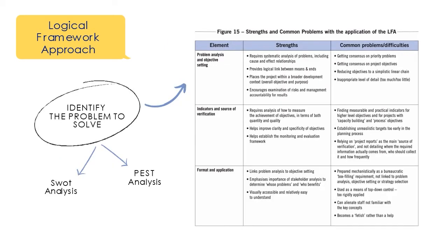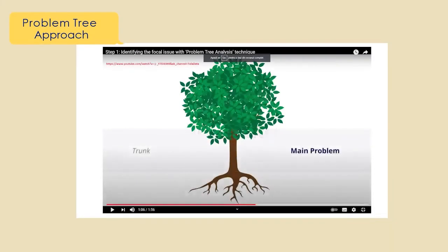As preliminary work to complete a logical framework, identify the problem or the need satisfied by your project proposal. After the brainstorming phase, you can prepare a SWOT and a PEST analysis. 1. Through SWOT analysis, identify the strengths, weaknesses, opportunities and threats of the project field. 2. Through PEST analysis, identify the political, economic, social and technological aspects of the study context. A way that helps us to select which parts of the general problem we can face through our project is the problem tree approach.